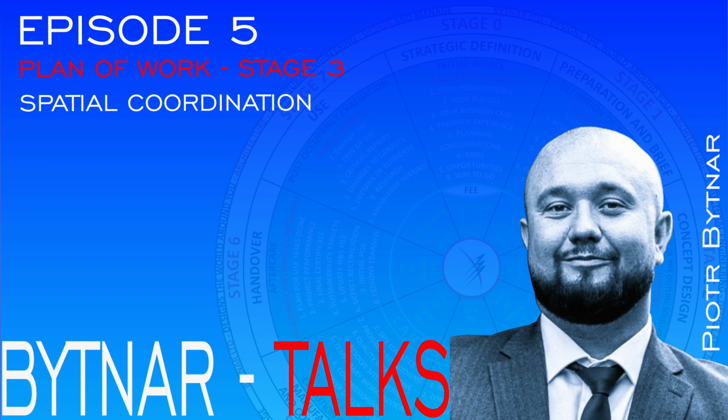Do not get me wrong, it is very often cost effective to go out with planning at the concept design stage, but such needs to be from the information point of view of the stage 3. What I mean by that, it usually is the case with the architectural services provided by non-competent people that such designs are then impossible to deliver on site, as they do not take into consideration structural ramifications, buildability aspects, possible methods of erection, building regulation, and the list goes on. Such designs are sent to the planning office for approval, and it is not the planning office's responsibility to check if such a proposal is fit for purpose. It is more to determine if such a proposal is fit for the circumstance.